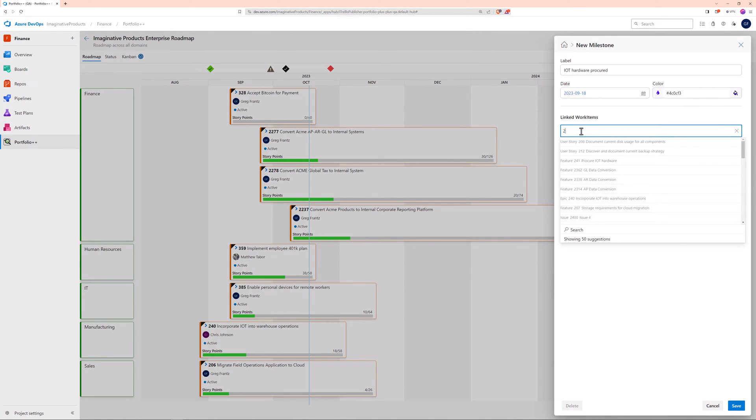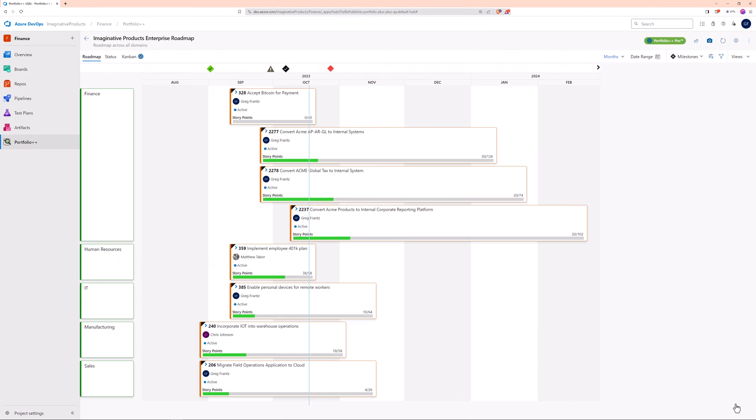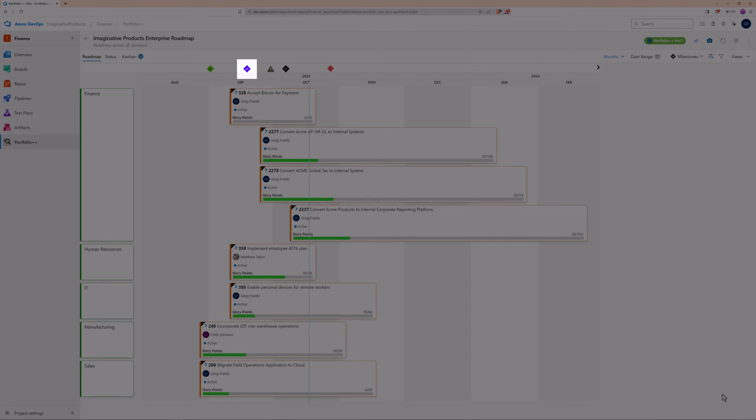Let's link this milestone to the procurement feature, which is already complete. Because the work item is complete, the milestone reflects this status with a checkmark.